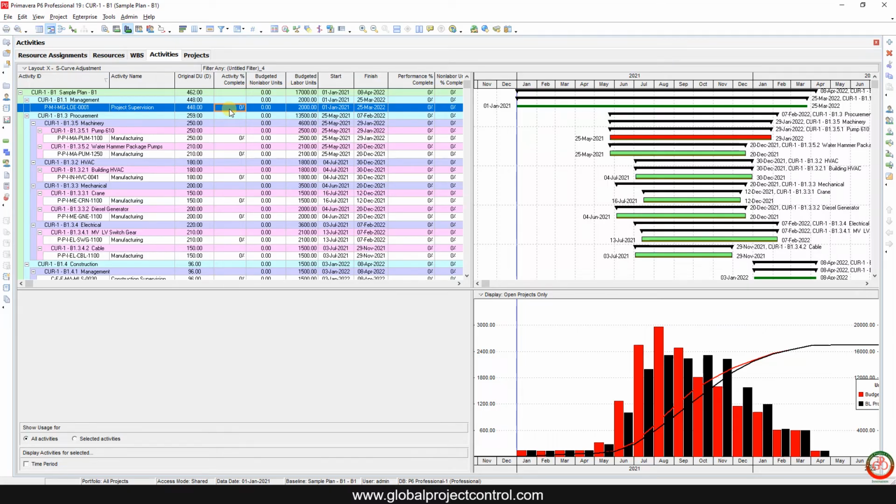Level of effort are supervisional activities. We cannot move them forward or backward, and it is not correct to move the budgeted hours for supervisional activities because you need them by average based on the project duration.